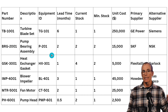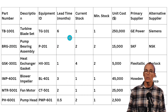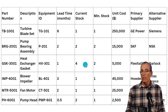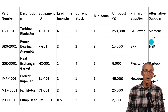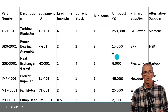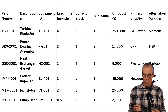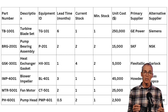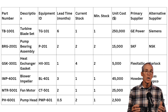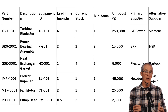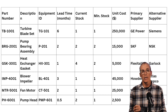The report will also show how long it's going to take to order and procure that equipment, how many are in stock, the minimum stocking level, the cost, the supplier, and the alternate supplier. If you show this to your insurance risk engineers, they can incorporate it into their risk engineering reports and you'll get credit for it in the underwriting process — especially for business interruption insurance — because it demonstrates that you've actively worked to manage your own risk and get back online before any insurance provisions have to kick in.